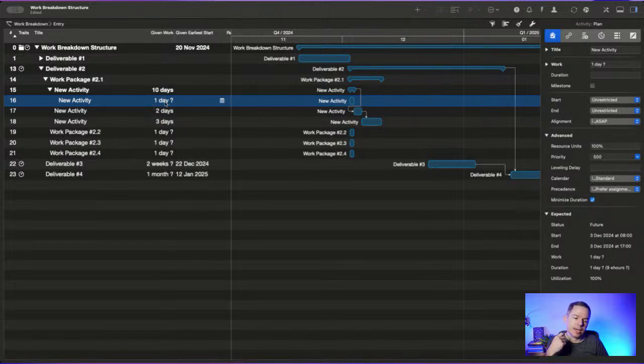So you can estimate the effort in effective hours or ideal hours. Ideal hours is like every day it's 9 hours of work, 40 hours per week, and this task can be done in 8 hours, so it means in a day. But you know, from Scrum and Agile frameworks, that people don't dedicate 100% of their working hours to a specific task. They have meetings, they have a lot of stuff. So a lot of considerations go into this estimation of just one task.